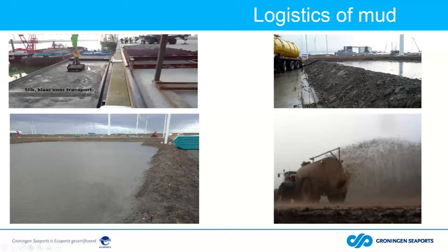So that's also why, from the left picture, we bring it from ship directly to the farmers, and later on we decided to store it for a moment. We had the time that the farmer needs to be ready to receive it, and we have the period that the dredger is available in the port. So the difficulty we fixed with a local storage.